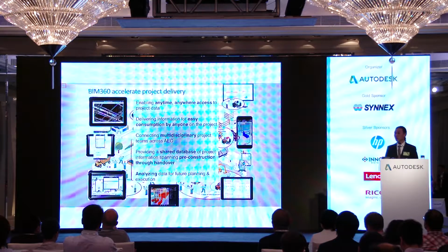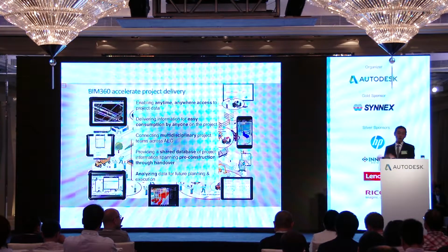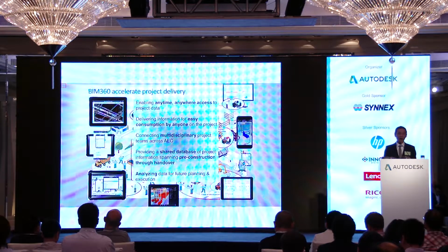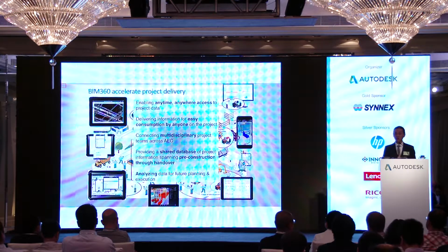But with Field as well, you can get the latest drawings and latest documents and review them. If it's wrong, if it's an issue, mark it up, and everyone can review it at the same time. And all your data would be the same as the consultant's if you're a main contractor. Instead of arguing about how many days it rained last month, claiming money or asking for EOT: data are the same. So last month has been 5 days of rain. Okay, fair enough. It's been 5 days of rain. I give you an extra 5 days.